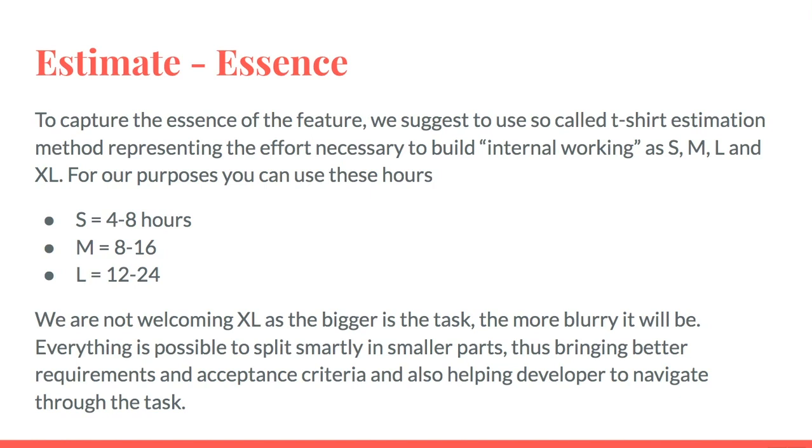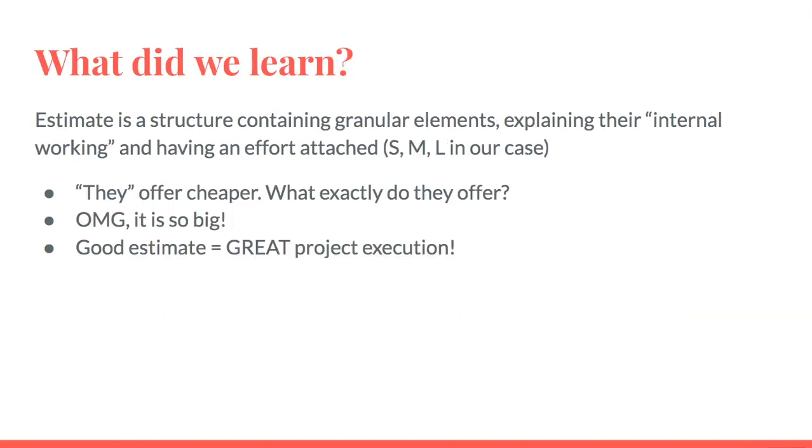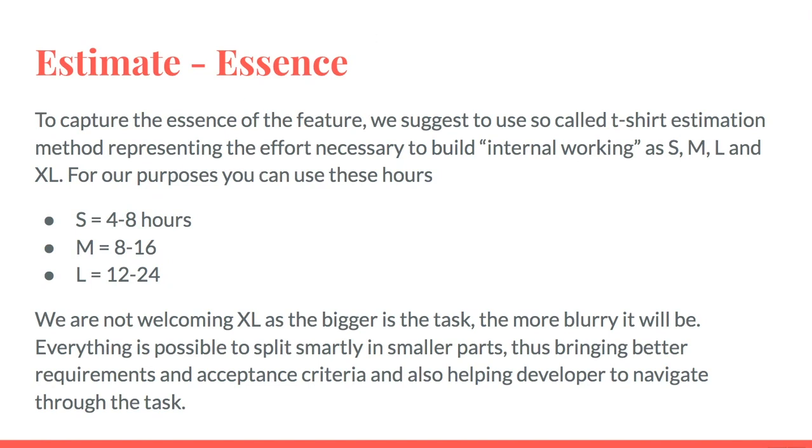If you just make something large, like let's make a newsletter module task, then it contains dozens of actions and elements, and there are high chances that something will be omitted, not described properly, or not understood. So we welcome, and especially for this task's purpose, we welcome small estimates that call for a granular understanding of the project and splitting your project understandingly into smaller parts.